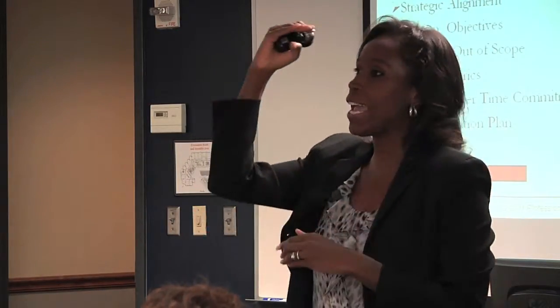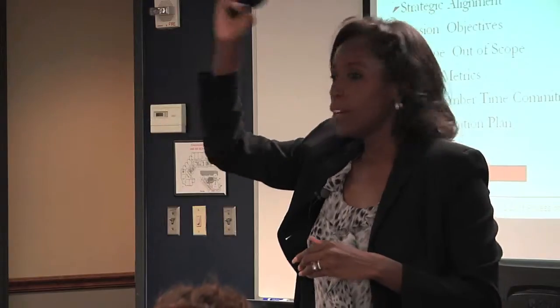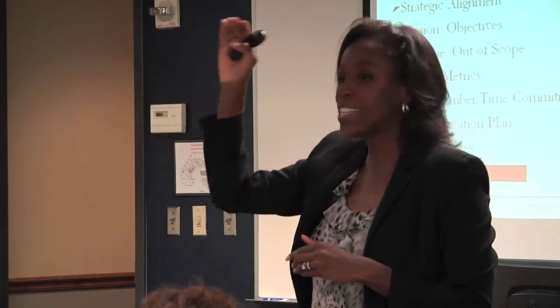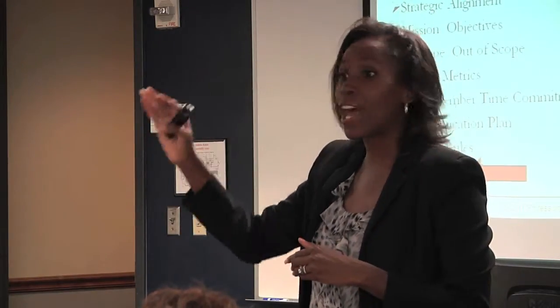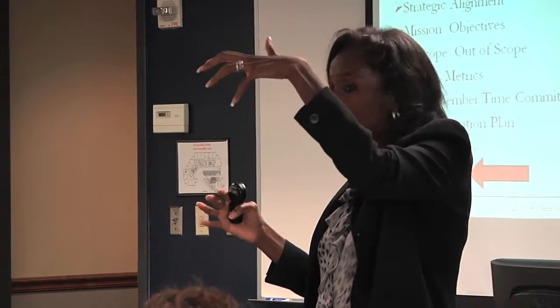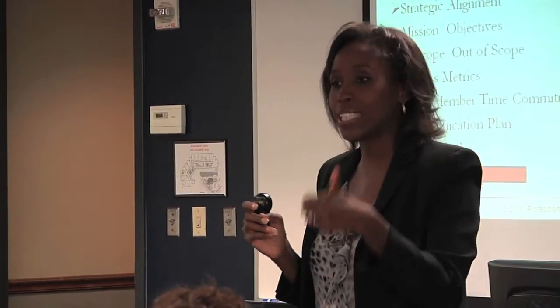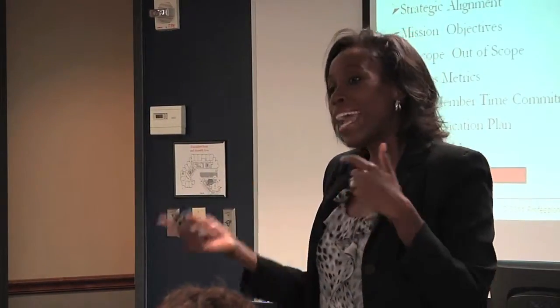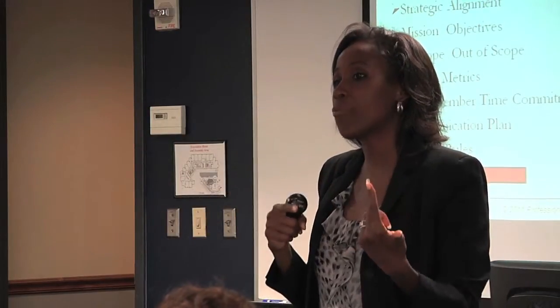So this way, if we said, hey, international, out of scope. Marketing, out of scope. Anything that deals with e-commerce, out of scope. So when those things come up, it's very easy to identify it and to shut it down. And we've already had that conversation up front.